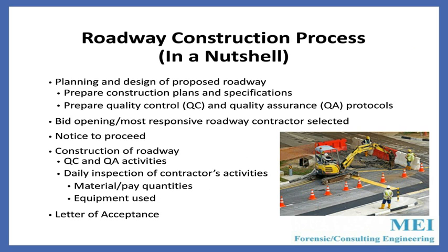Here we get into the roadway construction process. If you get one of these cases where roadway construction is going on, there are a lot of players and moving parts. At the top: planning and design of the proposed roadway. Someone prepares the construction plans and specifications. As part of those plans and specifications, someone must prepare quality control and quality assurance protocols. The difference between QC and QA: quality control is what the contractor does; quality assurance is what the engineer or representative of the owner does to make sure the contractor did his job. Once the QA results come back, that is when the contractor gets paid.